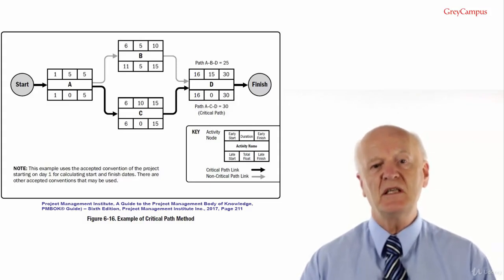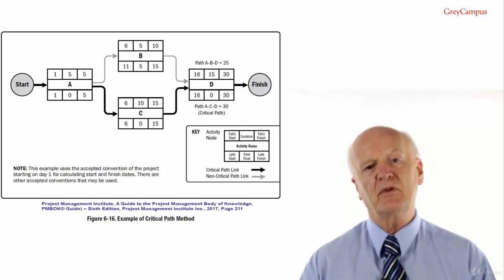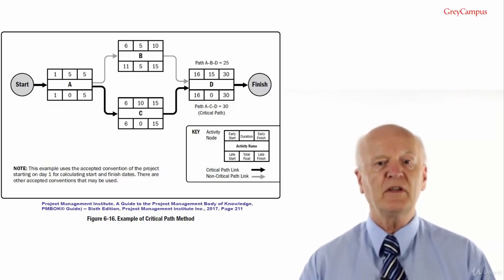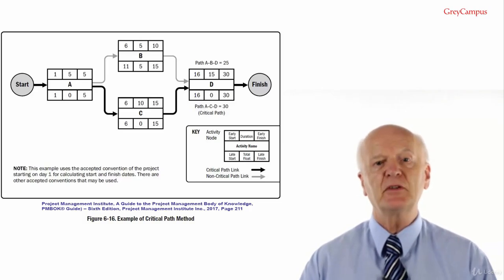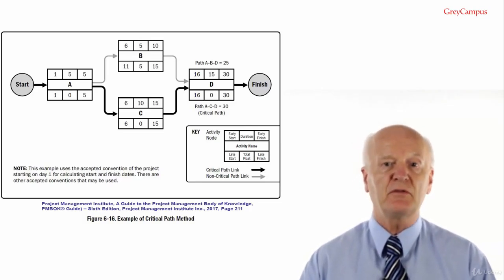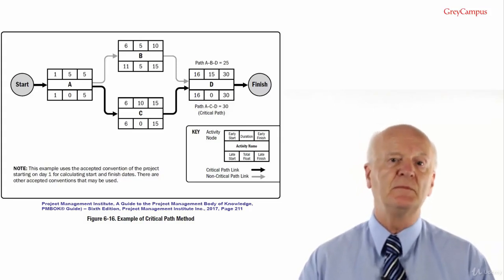The correct answer is D, more than 2. In fact, a project may have any number of critical paths, but all critical paths must be exactly the same length. The critical path method is used to calculate the critical path or paths and the amount of float and free float or schedule flexibility on the logical network paths within the schedule model.